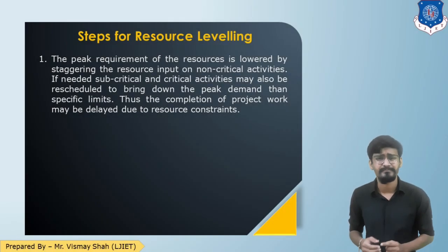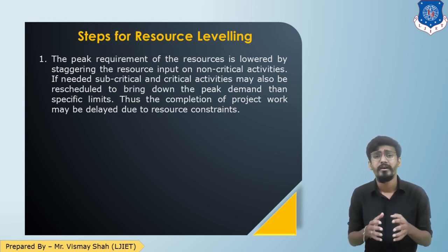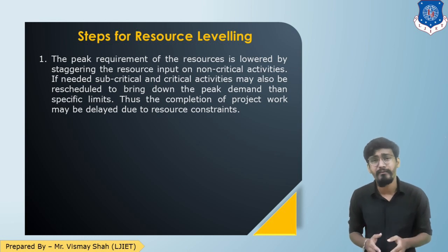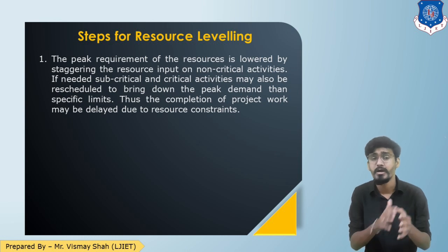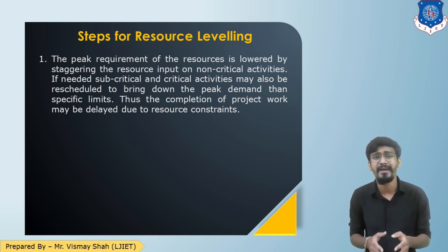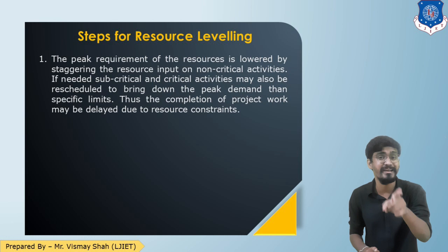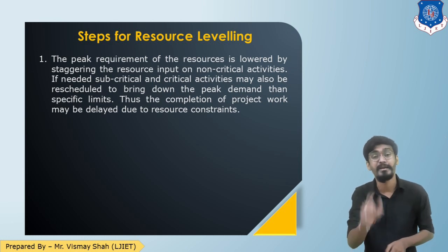Now let us see the step-by-step process of resource leveling. Step one: the peak requirement of the resources is identified and that peak requirement is lowered by staggering resources on non-critical activities. If required, sub-critical and critical activity resources are also used to lower the peak requirement. By doing so it may happen that the completion of the project gets delayed — unlike resource smoothing, where there was a time restriction.